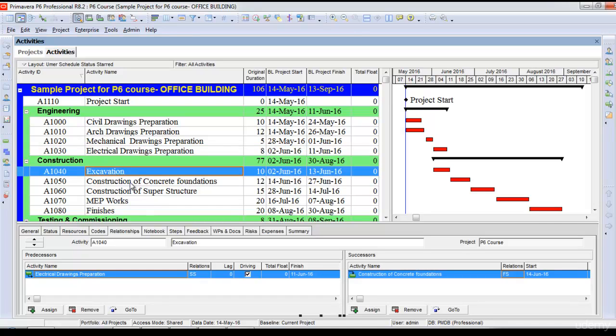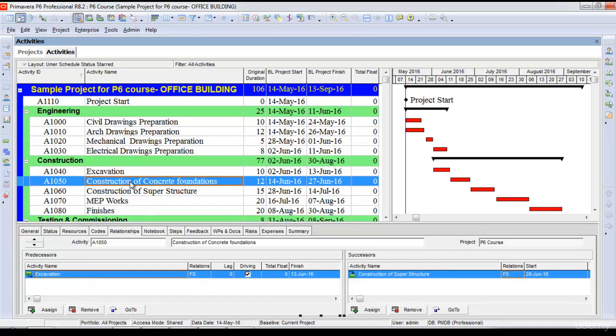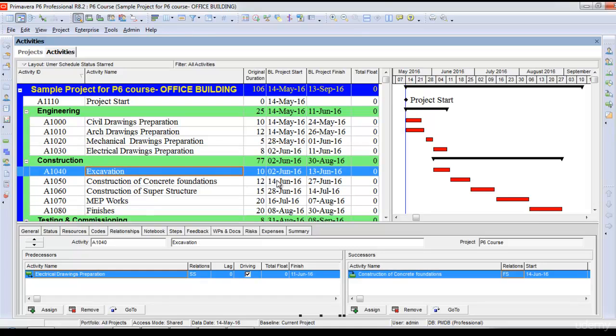for excavation and construction of concrete foundations, I don't want to wait the full 10 days before starting concrete foundations. I want to start concrete foundations after just six days of excavation.